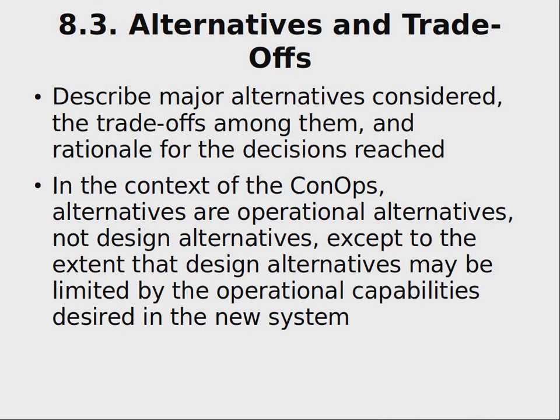A few alternatives are always good. Approximately two to three different alternatives is good enough. If you are going into many alternatives, then probably you have not done your priority analysis and risk analysis well enough, because it means you do not have good preferences for what is the best solution for a particular problem.